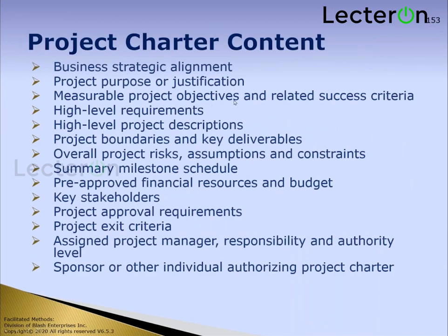What are your objectives, success criteria, bullets. High-level requirements, high-level projects, risk assumptions, constraints. Maybe a milestone schedule, if that's important. Maybe some key financial information, if that's important. My concern I have with these two is I want to make sure they're really valid, or whether somebody just pulls some numbers out of the air and didn't really do the analysis of what it was going to take. Some of the other things, but bottom line, who is the project manager and who's the sponsor?